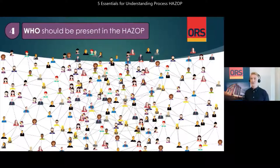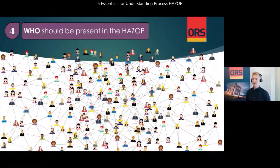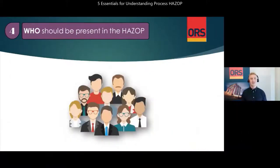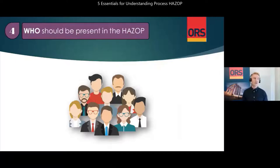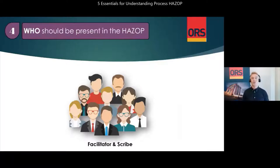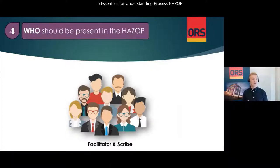Who should be present in the HAZOP? The number of participants during a HAZOP should be minimized to a core team, to ensure that the session is effective and does not derail into discussions. The size of the team depends on three things: the size of the scope of the HAZOP, the complexity of the process, and the number of interfacing systems with the process system under review. As a rule of thumb, the HAZOP team should include a facilitator — normally an independent person with sound knowledge and experience of HAZOP techniques and some understanding of the industry, the process design under review, and the hazards related to it.